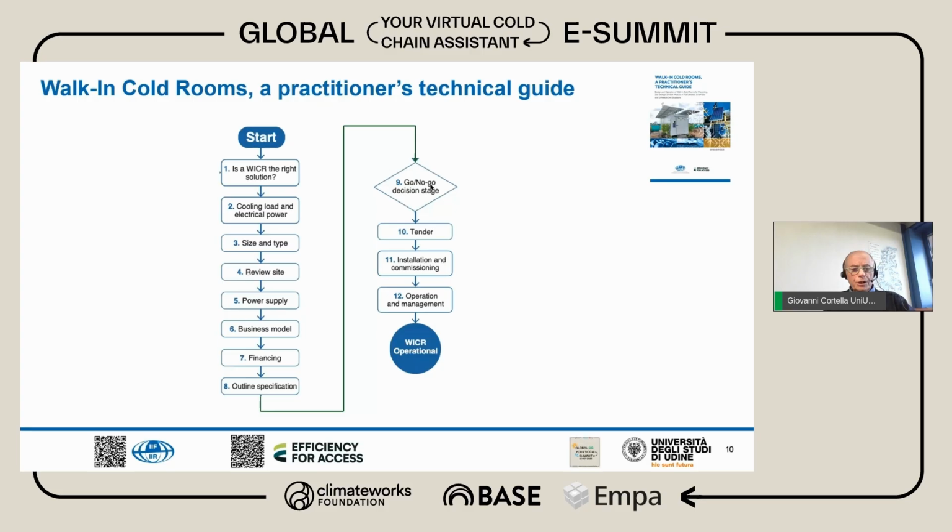If we decide to go on, then the tender or procurement process starts, and then we move to installation, commissioning. Installation is a crucial phase. A good installation prevents unexpected failures in the future and allows a long lifetime of the system. And also commissioning, and if the case testing, Sonia will possibly talk about that, is important as well for the same reasons. Finally, during the lifetime, the system has to be operated, maintained, and managed, and this is the last step in the guide.